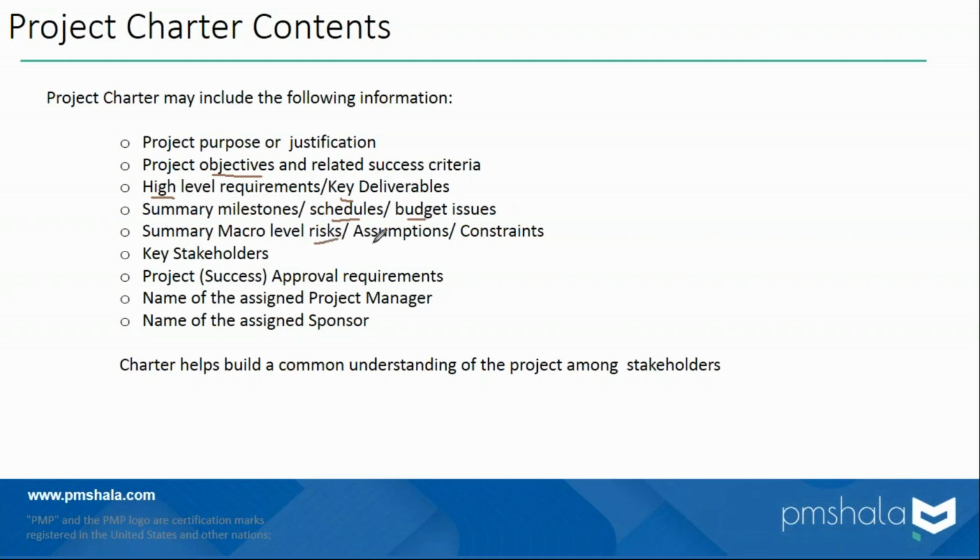Then risks, assumptions, constraints can also be there. Again, all high level. More so, we are doing no risk management at this moment. Please note, risk identification is a part of planning. We'll study that later. But some major risks that might be known, it's a good idea to capture them here. Similarly with any major constraints and assumptions that might be known. It's a good idea to have them in the charter so these are not lost. We'll identify many more during the planning stages.